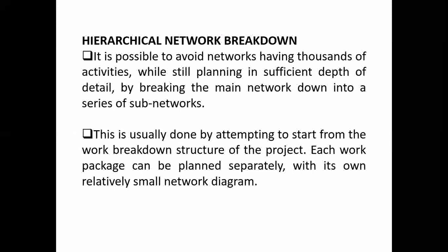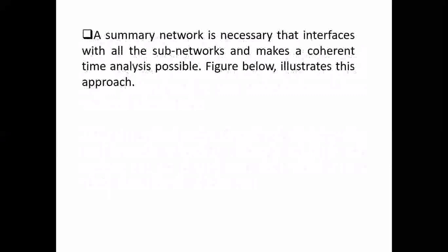So the principle here is to break down a bigger network into smaller sub-networks which can be handled or examined individually. This is usually done by starting from the work breakdown structure of the project. Each work package can be planned separately with its own relatively small network diagram. This way, you will be able to examine all those work packages successfully. So in summary,